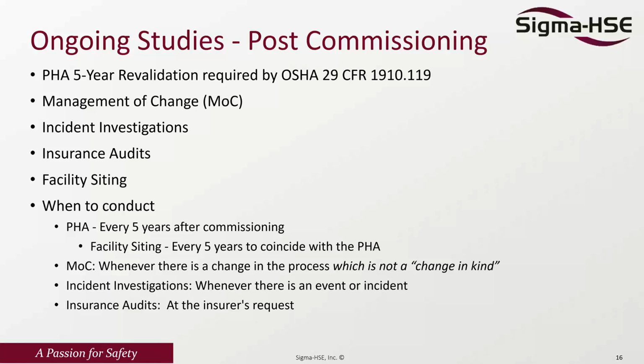The post-commissioning studies are completed every 5 years after commissioning and involve management of change, incident investigations, and insurance audits. All 4 of these should roll up into the 5-year revalidation.